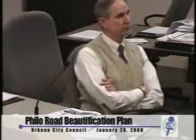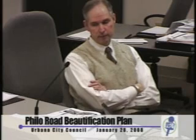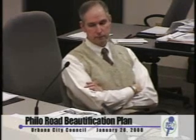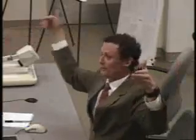What we did is, in that image that you see in front of you, we took all of the amenities that were in the right-of-way, including all the improvements, less any of the street improvements, not the restriping. So we took all the trees, all of the sculptures, the bike racks, everything, and there is a length, and we took all those costs and said that at this length, there's this much cost. Well, that only covers that much between Colorado and Florida. So then I measured from Florida to Colorado and said, okay, it's this length, so that's your multiplier. It's that percentage of that area. Oh, I see. So actually it's a multiplier of all the costs listed above times the amount of units over. Right, it's a length times.